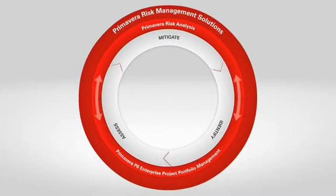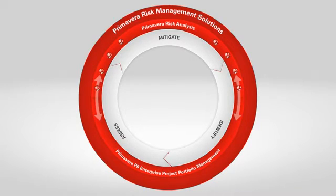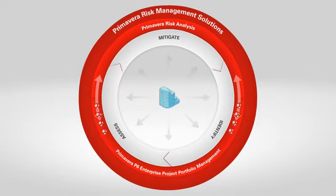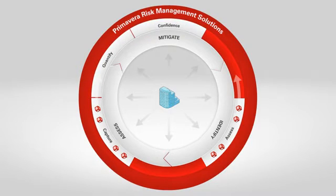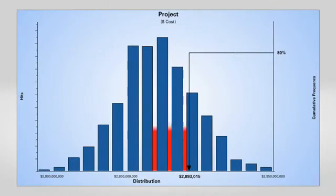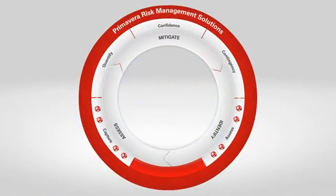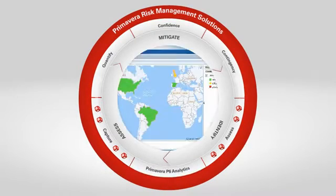The integration with Primavera Risk Analysis allows for a seamless flow of project and risk information between the products. After risk and project data is analyzed, the risk-adjusted schedule information flows back into Primavera P6 Enterprise Project Portfolio Management. This process helps your organization succeed through a consistent iterative process of capturing and assessing risk in P6 ePPM, quantifying the impact of the risk, and determining the confidence level in the project's success while ensuring the right balance of contingency is allocated. Finally, risk is evaluated across the project portfolio using Primavera P6 Analytics.